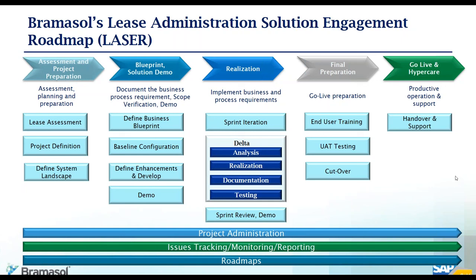Then go live and hypercare. We do not want to leave you behind with a new solution. Unless the client asks for a dedicated training module, we use the concept of train the trainer, where we start with super users and train them so that they become the trainers for your extended user base later on. We typically start from 2 to 4 week cycles there. Then handover and support: until your first fiscal year closing, we typically make sure we have a handhold there before we depart the project team.